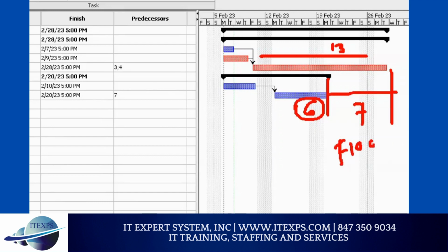Good thing, bad thing. Right? So most managers try to give a reasonable schedule. Reasonable schedule means this is called back-to-back schedule. You guys agree? Back-to-back schedule means when this completes, next starts. But what if this activity takes a little longer? Then your risk, right, project will be delayed. Otherwise, you have to squeeze this activity a little faster. There are only two options you have, right? If the first activity takes longer, then the second activity is going to be pushed, or the second activity has to be compressed. Do you guys agree or not? Am I making sense or not? Let me repeat one more time.